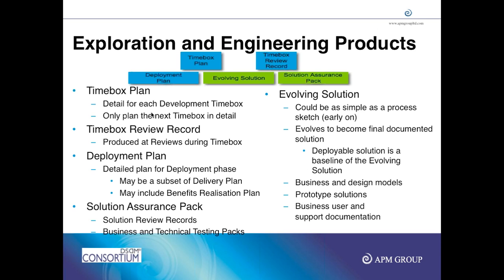When the time box starts, the solution development team makes the time box plan that shows how each time box, how objectives of each time box will be met, like breaking down into activities, who is doing what, efforts required, and the schedule, like dates, etc.